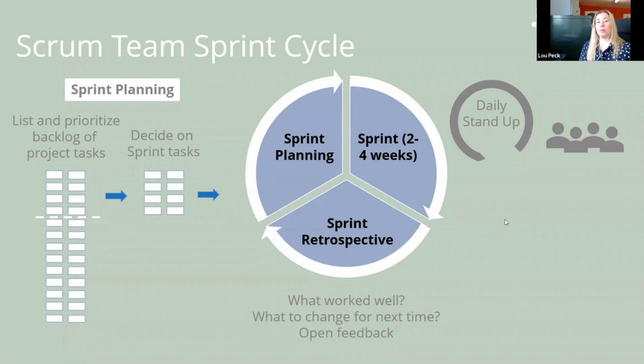So then you have sprint planning, and as soon as that meeting has ended, you actually start the sprint straight away. Once you do the sprint retrospective, that's been and gone, done. And then you move into sprint planning. If you've got any tasks that you didn't get done in the sprint that's just been and gone, that's when you put them back in your list and say, right, are they still a priority now based on the other work I've got to do, and should I be doing them?